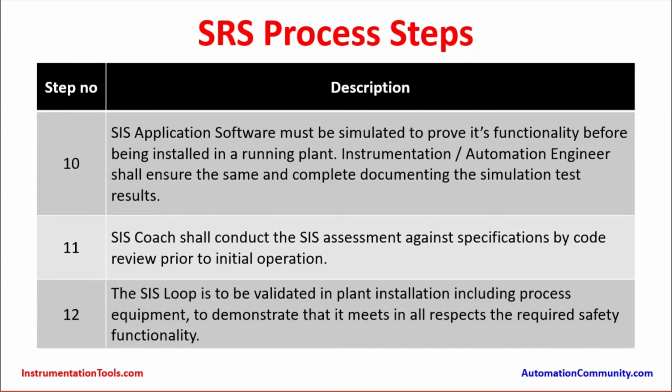How to do that? Either the tank has to be filled with the equivalent fluid. If it is a hydrocarbon, that may not be possible, so they need to use an equivalent fluid or water or something, and then raise the level and see that it reaches the 80% level. At 80% the sensor gives an indication to the logic solver. The logic solver does the internal arithmetic and then sends the signal back to the valve to close it. This complete testing is known as validation. It has to be done for the respective individual loops.